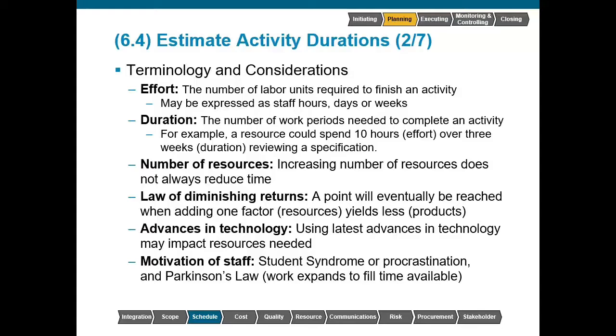Some terminology and considerations when it comes to estimating activity durations. When we discuss effort, that is how many units of time it will take to complete an activity. So we can express this as labor hours, days, or weeks, but we want to think about this in a continuous manner. If I tell you it will take 40 hours of effort, that's not to mean that we're going to work 40 hours straight. That 40 hours is going to be broken up based upon the availability of the resources to commit themselves to that activity. Duration refers to the number of work periods needed to complete an activity.